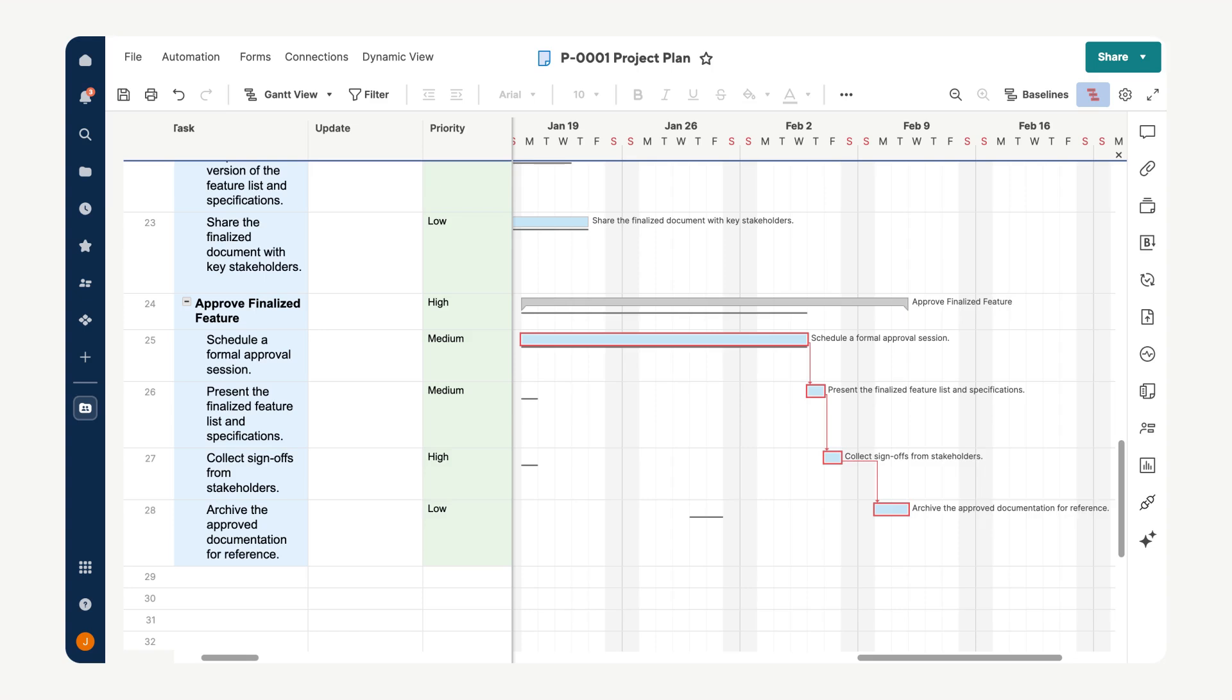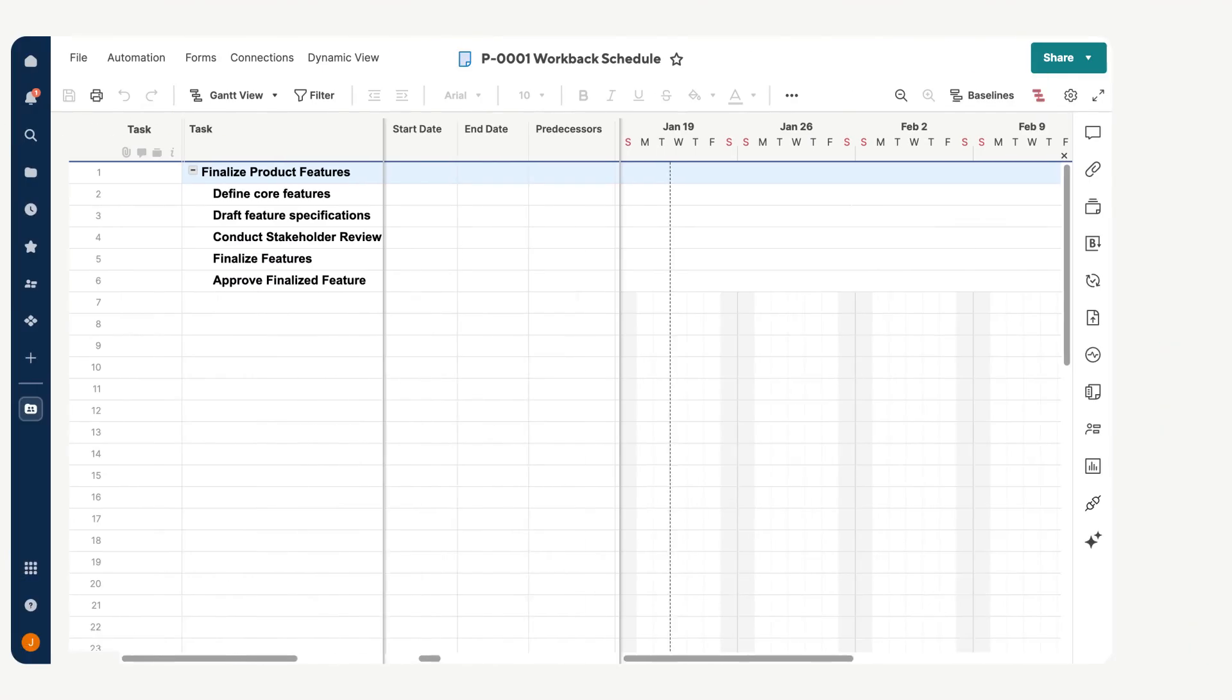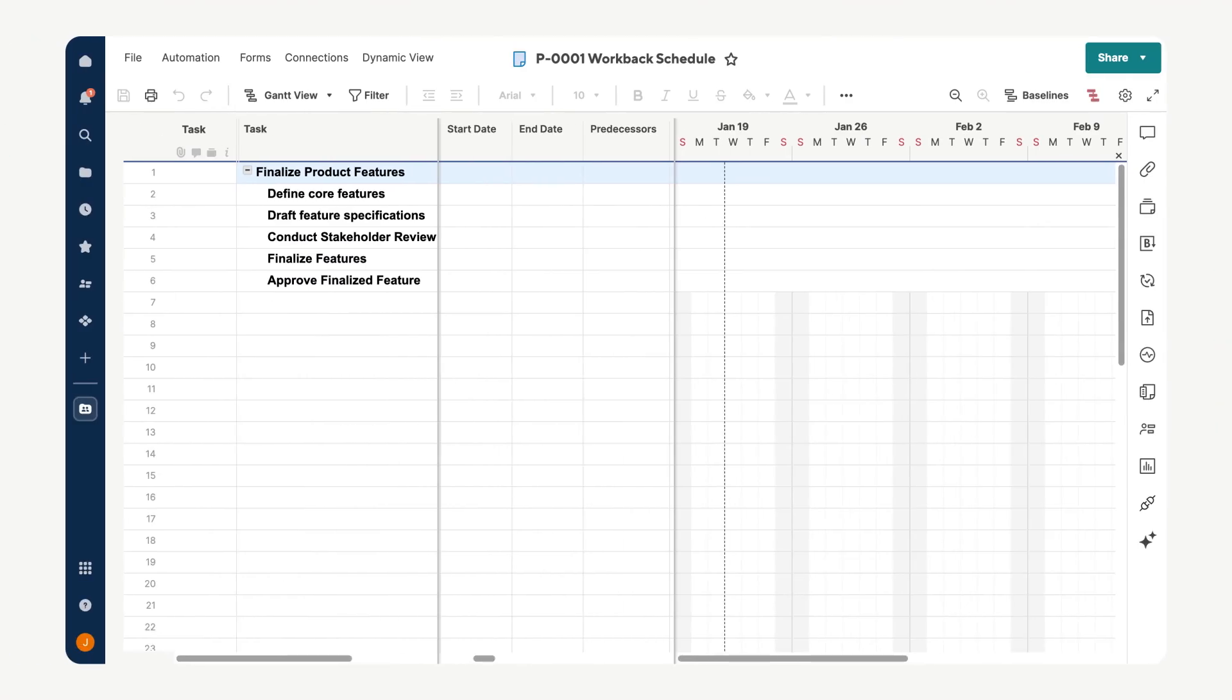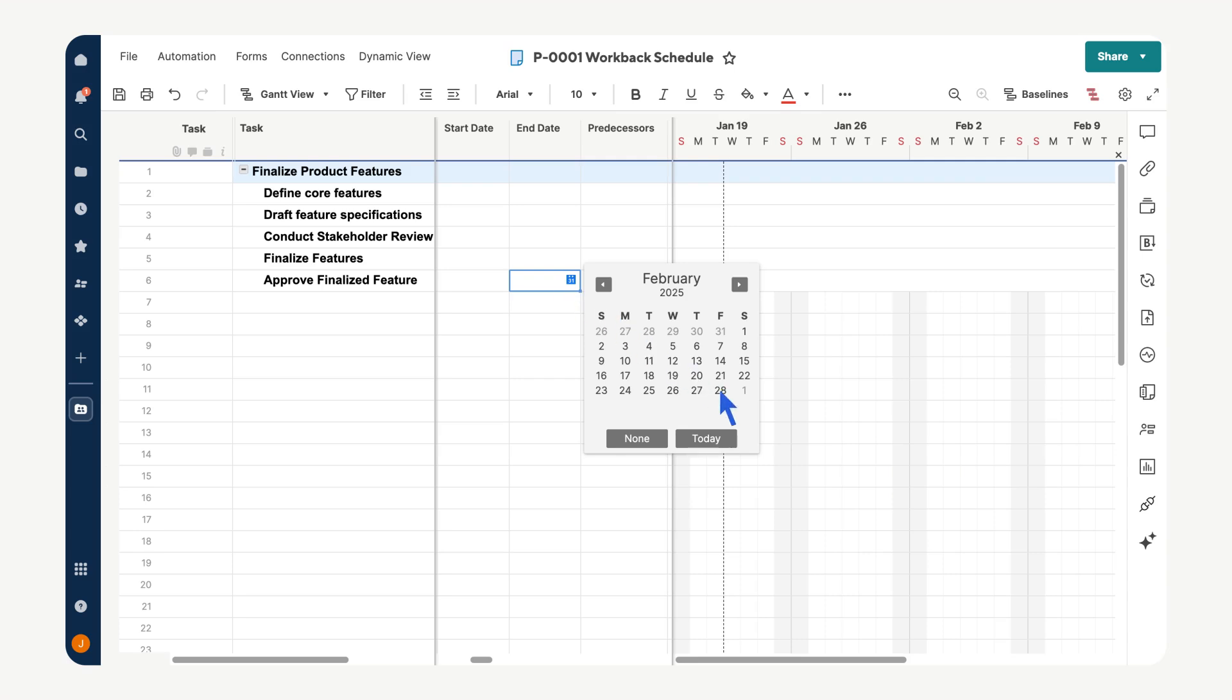A work back schedule is a great approach for projects with fixed deadlines. Instead of building the timeline forward, start with the final task and work backward. Set the end date for the last task to establish your project's endpoint.